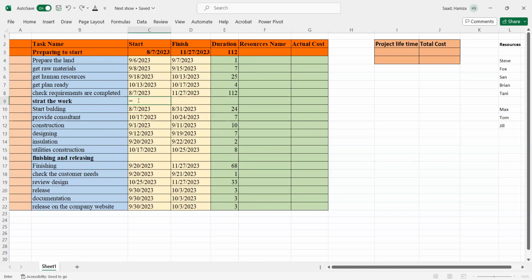Same for the second step. I'm gonna say minimum, and we're gonna include all dates to give me the lowest one. Now this is gonna be maximum. We're gonna get from the range the highest one. Then we're gonna subtract end date minus start date to get 79 days.